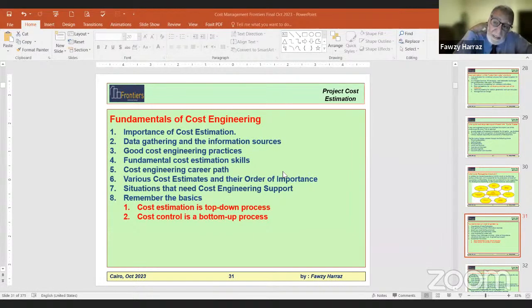So coming back to the task where cost engineering is highly requested to support. And then you will tell him, okay, we used to buy from the Far East, cheap markets, but we will buy from Europe because the shipping time is 4 or 5 weeks shorter. So this supports the schedule. The prices may be marginally higher, but we agreed that we will pay some more money to avoid the delay penalty, which is big money.